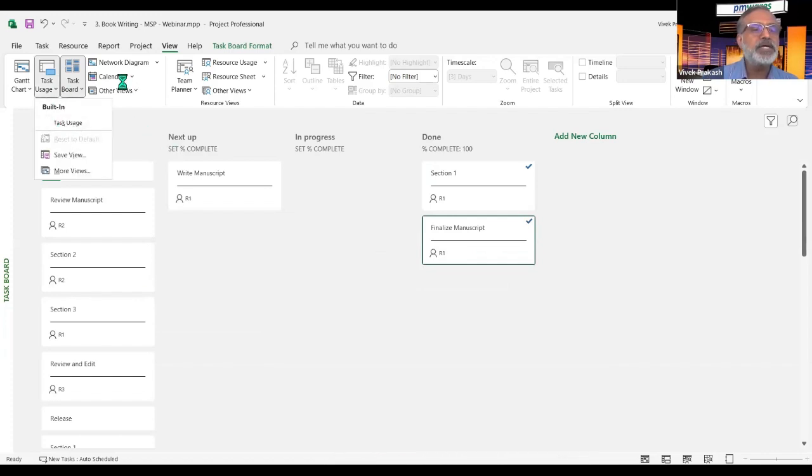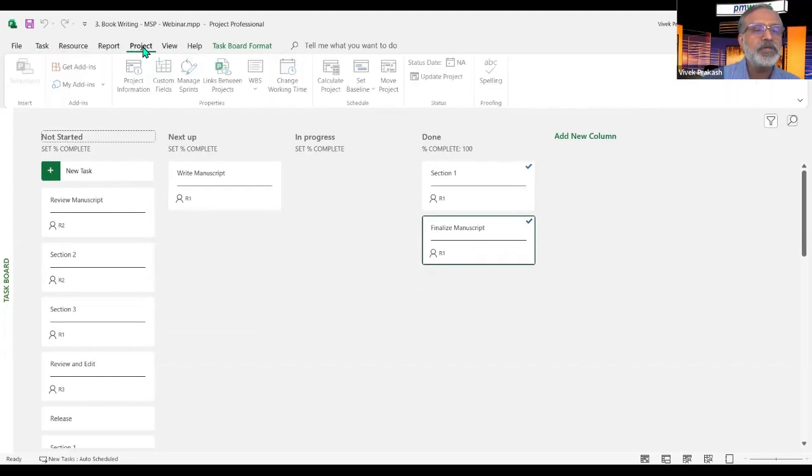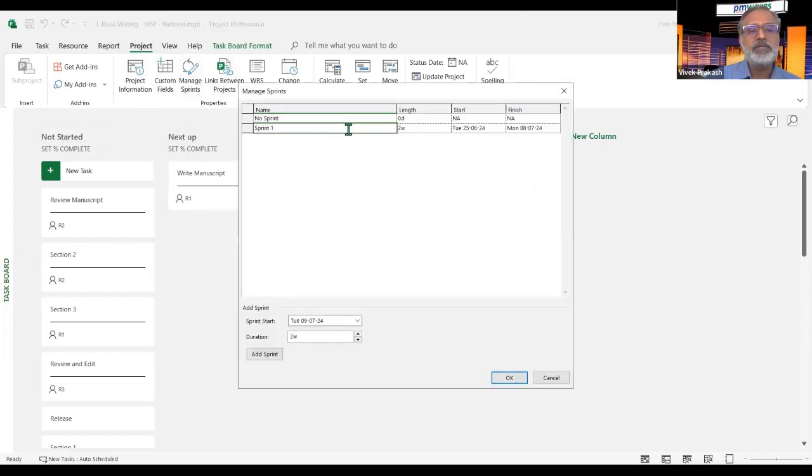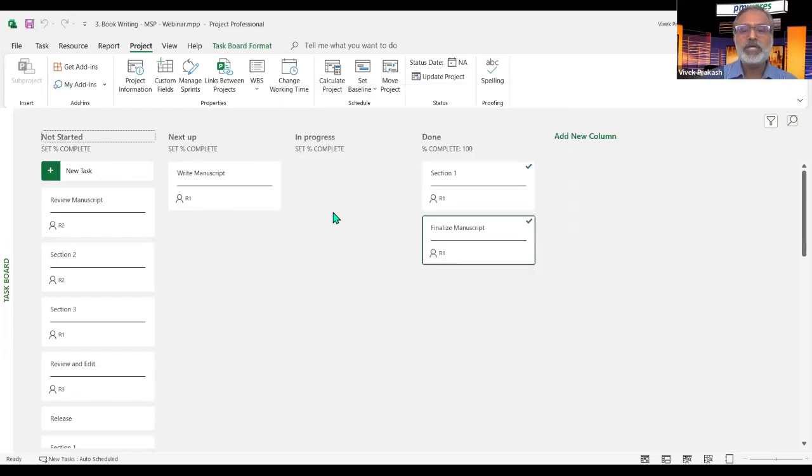So you have the Kanban board, and if you go to the task view of the project, you have Manage Sprint. You can create and develop sprints of 2 weeks, one after another. Add a sprint, add these tasks to the sprints, and manage them here in the tool. But this tool requires $30 per month. You need that only for project managers, not the other people. Others need only the $10 license.